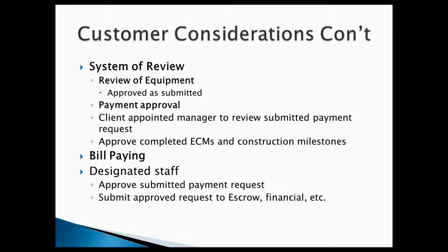The other part of the review system would be payment approval. The customer-appointed manager reviews submitted payment requests. When the ESCO finishes an ECM or reaches a milestone in the project, he's going to submit a payment request for those completed ECMs or milestones.